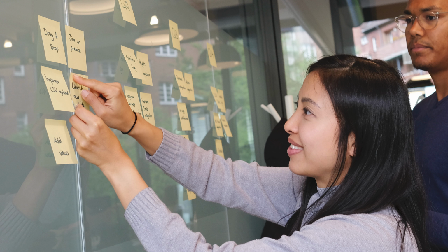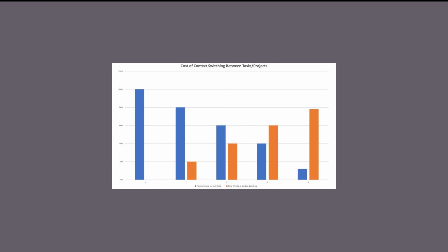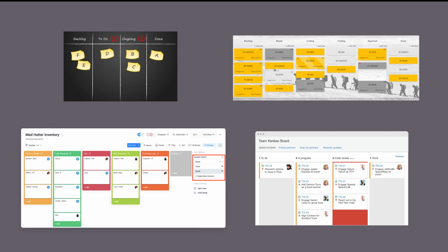If a lot of the tasks that you do are dependent on a third party, you need to set your WIP higher, otherwise you might be sitting around and not doing anything. However, having too high a number might tempt you to switch constantly between tasks, which would result in everything taking way longer than it has to. I personally would start with 3 cards per person as the WIP and then adjust. But don't increase that number just because you don't feel like doing the other stuff.